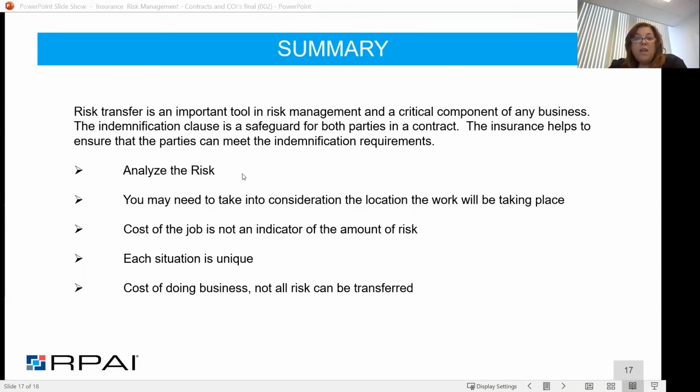When we're looking at it, you have to analyze the scope of the work that they're doing. I may put out that there's $1 million required, but perhaps this is a smaller job and a smaller contractor, and maybe this guy is the most reasonable, or he's familiar with the property, and maybe he doesn't carry what our standard requirements call for. I have those discussions on an ongoing basis. I analyze the risk versus the reward, right? The lower cost, the person who's familiar with the shopping center perhaps. I need to take all of that into consideration.